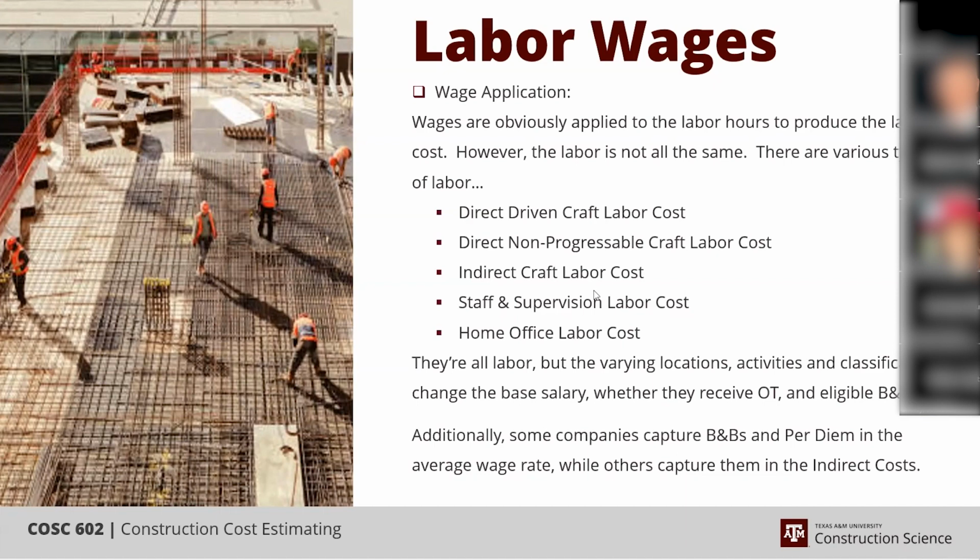Staff and supervision in the field are salaried, they get paid overtime, but they get paid straight overtime because they're salaried. And then all the craft who are hourly get paid overtime, and they get paid time and a half because they're hourly, and by law they have to. So salaried personnel by law do not have to be paid overtime. So you get a little bit of discretion in there.